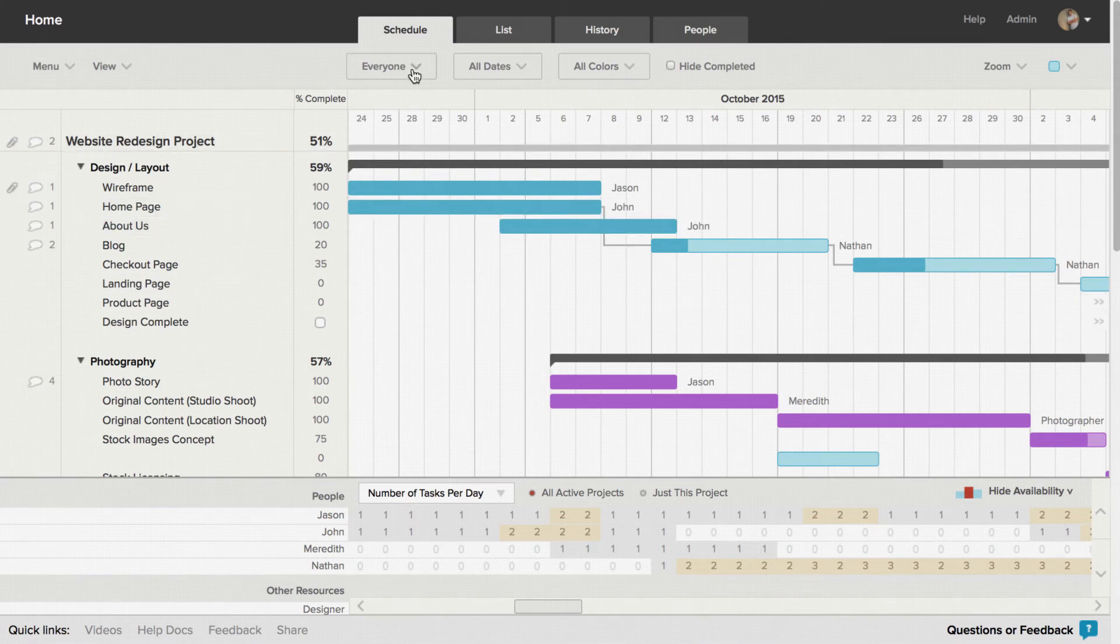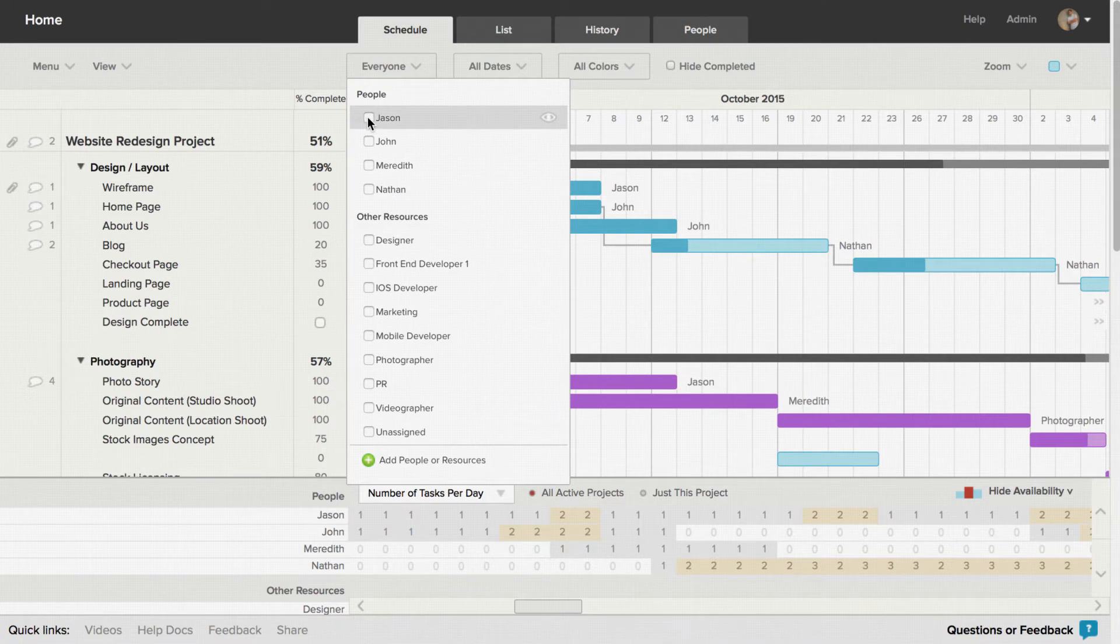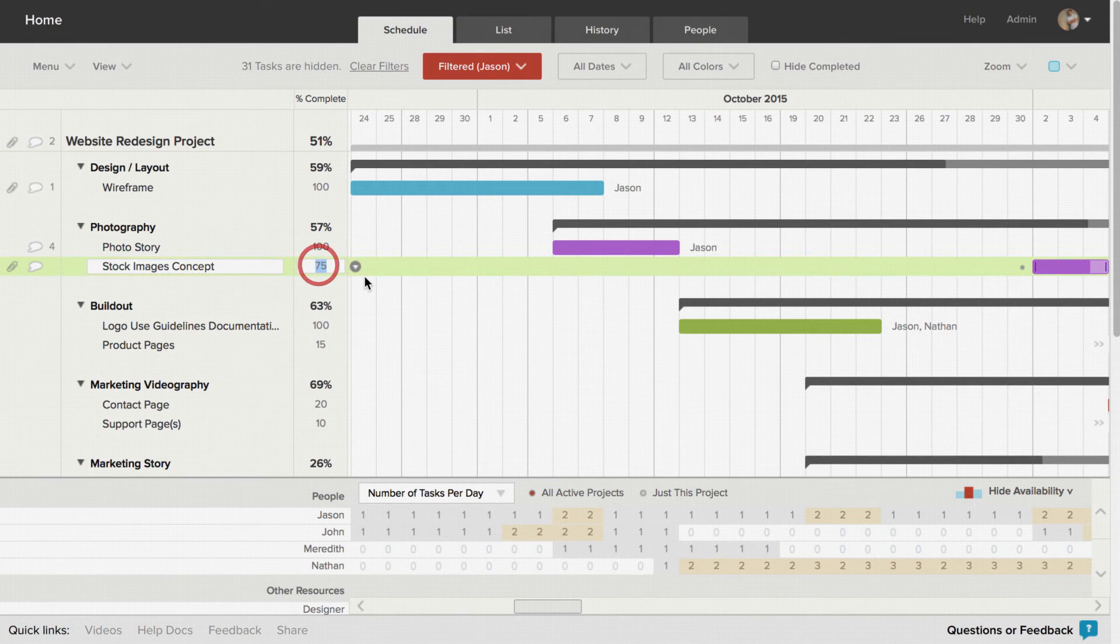Initially, you'll probably want to see just the tasks that you've been assigned. You can use filters to see only your tasks. Then you can simply click in the Percent Complete column to update your progress.